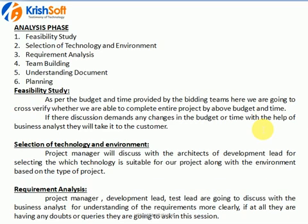The next activity in analysis is selecting the technology and environment: which technologies to use, which database, what development language, what servers, and what tools are required. After that comes team building. The project manager, based on the challenges identified, determines how many people are required for development and testing. If there are bench resources — people recruited by the company but not yet allocated to any project — they will be assigned to the project.